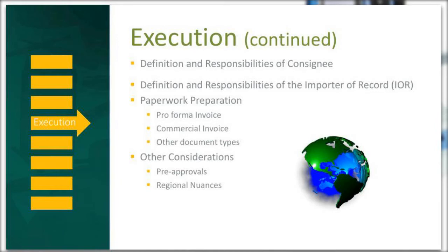So, another area on the international documents would be the commercial terms. In other words, who's going to be responsible for the liability of the shipment from the time it leaves the port of export to the time that it arrives in the port country. So, it's very important to understand who is the responsible party that's going to assist the courier or the carrier for clearing the goods in country. Who's going to be responsible for paying for the customs and duties and VAT clearance charges imposed on the goods.